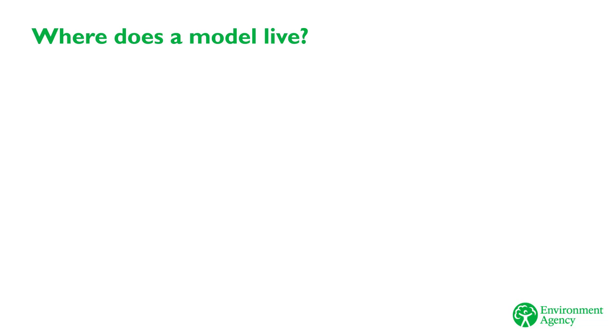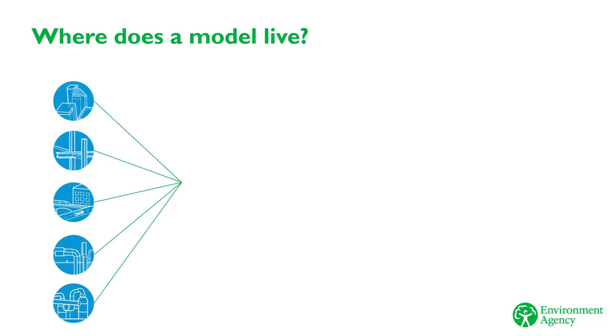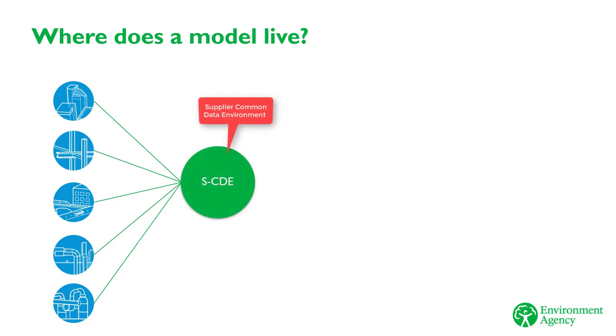Model files are created by your suppliers in their native authoring tools, for example, CAD files, and stored on their company servers. These may be stored in a Common Data Environment, CDE, where their development, checking, and approval may be managed through workflows. Once the information is developed to a suitable level for sharing and review, they will upload to the Supplier Common Data Environment.